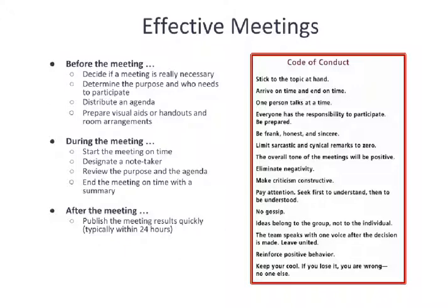Meetings should not always be used. If you look here on the left-hand side, before you have a meeting, the first thing to do is decide if a meeting is even really necessary. Because a meeting is costly. You're engaging the time of multiple people, sometimes 5, 6, 7, 8 people may be called to a meeting. And if that meeting lasts an hour, you just used 8 hours of skilled labor in that meeting. The question is did you get 8 hours of value out of that meeting?